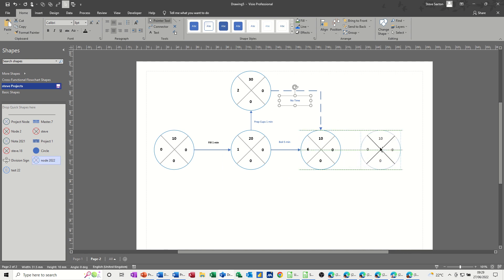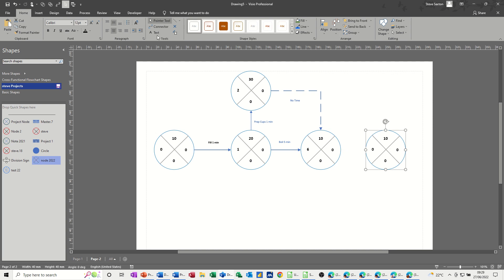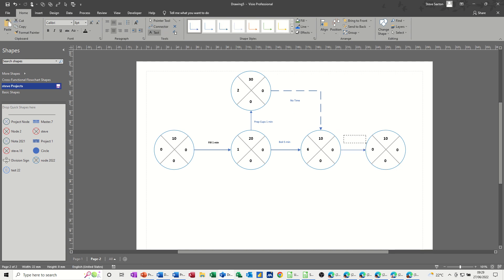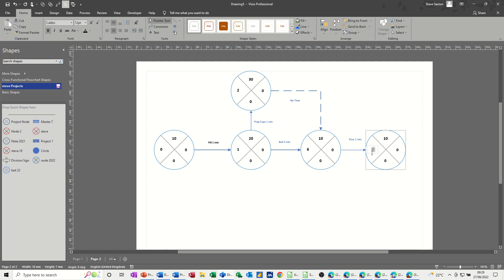So we're boiling it, now we need to pour the water. We can't pour the water until we've done this — that's why that node is connected as it is. I'll bring another node on and connect it up. The text box says pour water, and pour is just one minute. So that's six, and this node needs to be seven. That's 30, this is 40, and this will be 50.